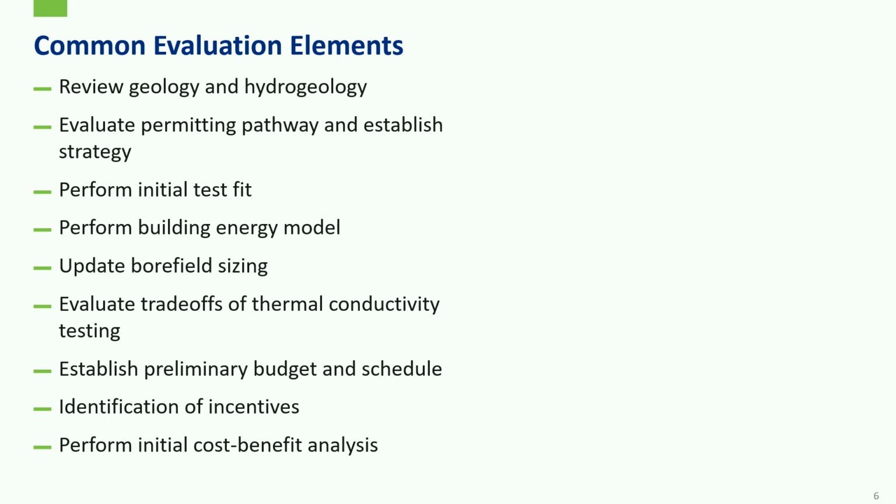So a lot of times we'll put that off until we get into an early design phase. I've also seen projects where you let that go a little bit longer into design, and then you validate when the drilling actually starts and you've got somebody mobilized. It's a little bit more precarious. There's more risk sharing there. Once you've got some thermal conductivity, now you can really establish a preliminary budget.